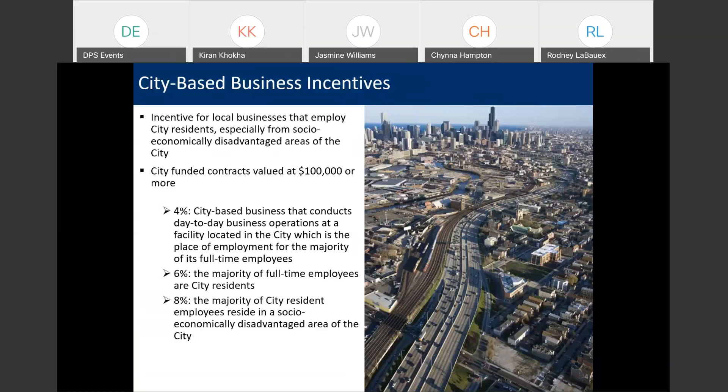If in addition to that, at least 50% of your employees are city residents, then you're eligible for a 6% bid incentive. And then if you're eligible for the 6% and the majority of city residents live in socioeconomically disadvantaged areas of the city, then you can actually get an 8% bid incentive.